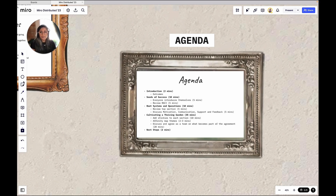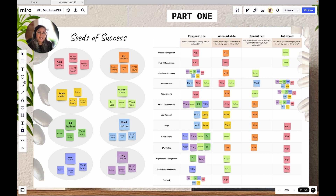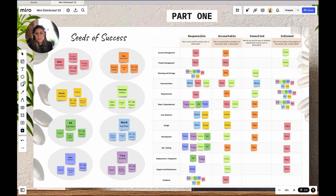Let's move to part one: Seeds of Success, which focuses on roles and responsibilities. I fill this out in advance using the pre-work survey responses and using the copy-paste-from-table feature to turn it into stickies in Miro. I give everyone a different color so we know who's saying what throughout the entire team agreement. On the left you'll see each person's name with their pronouns, their role, their time commitment, their location, and time zone. On the right, you'll see a RACI matrix, which is typical of projects — I've just edited the functional areas to match our team needs.